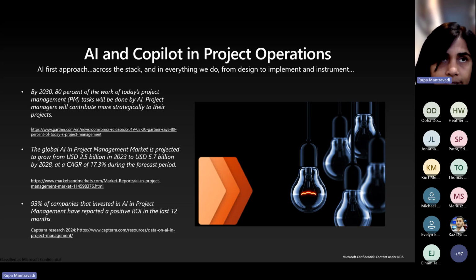Third is utilization of the resource and skills and competencies. And the fifth one is pure AI, which is basically the experience level of a resource. What other projects and tasks this resource has put time on, and then make a correlation between those projects and tasks with the current project and task and give a weighted experience score for the resource for this particular task.